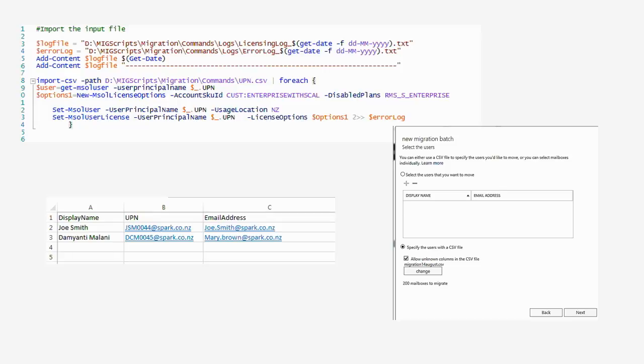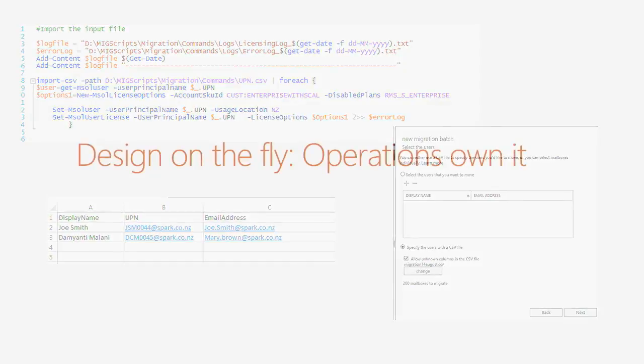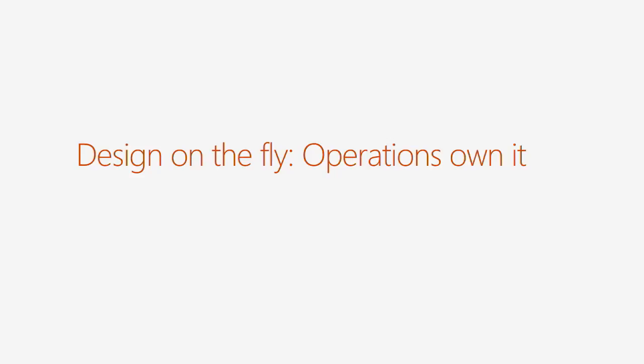So once we'd completed our migrations on cloud, well, not completed, we were getting into a really good rhythm about how we were doing it, we did finally get that decision from the business about who had to stay on-prem and who was going to the cloud. And that meant finally we could actually size our database availability group and size our databases on-prem. So I'm just going to briefly give you an overview of what we did to migrate our mailboxes from 2007 to 2013.